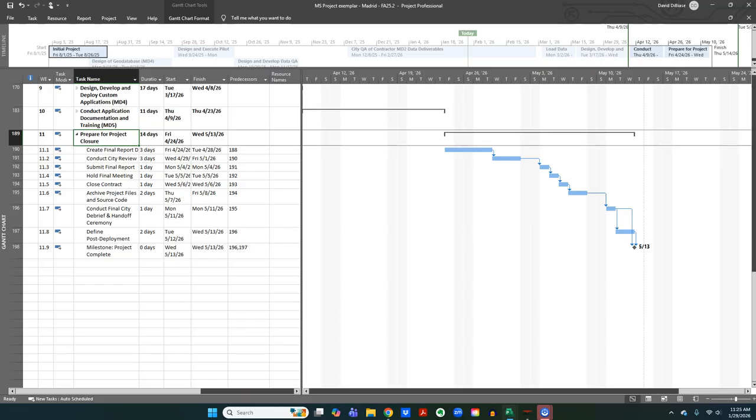In general, you should aim for a very minimum of 100, up to 200 tasks. Some students have identified 400 and more tasks, but that's kind of going crazy. You don't need to do that. If you can get between 100 and 200 tasks that lead to the successful completion of your project, you will have done well.